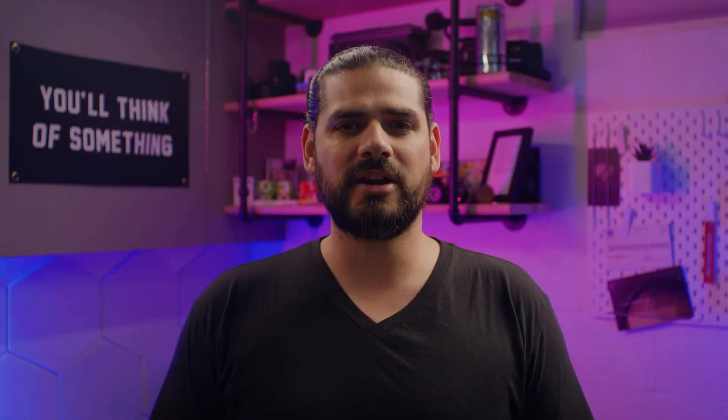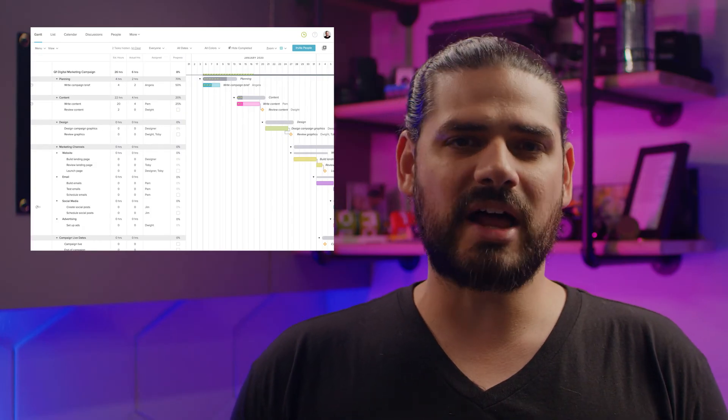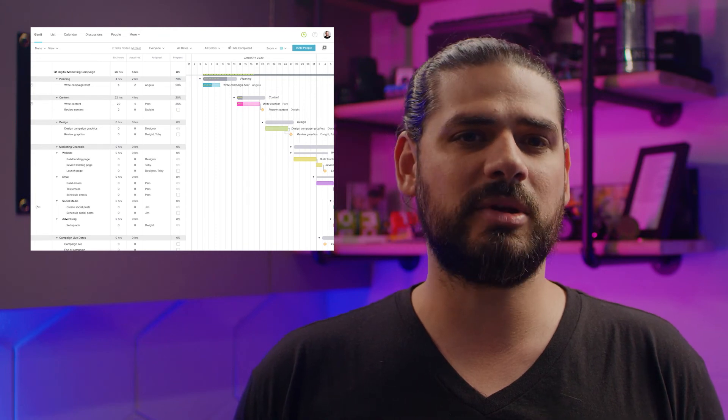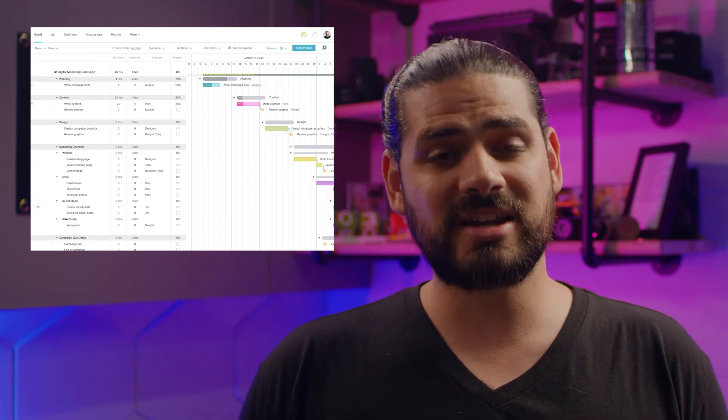Use your fully formed plan to monitor progress on your campaign and communicate with team members on deliverables. In TeamGantt, the thin striped line that appears inside each taskbar enables you to see how your tracked time compares to your plan, so you can catch potential overages early. Be sure to regularly track and analyze your campaign results so you can make adjustments and optimize your campaign along the way. For instance, if LinkedIn ads significantly outperform Facebook ads, consider increasing your LinkedIn advertising and decreasing your Facebook spend.